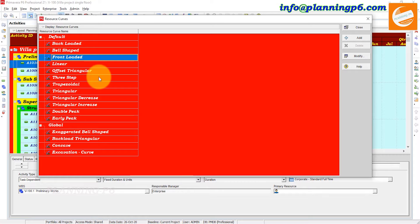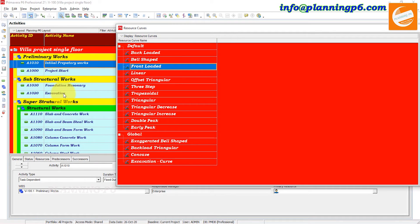For example, let's say we have an activity — excavation. You are sure that in the beginning the productivity will be less, in the middle productivity will be more, and then the productivity will again be less. In a project, there is a point in an activity where productivity is at its peak level.